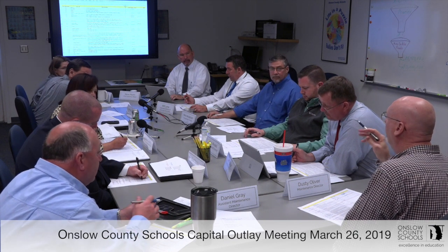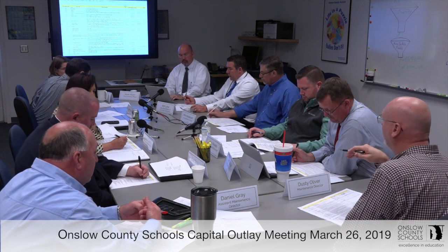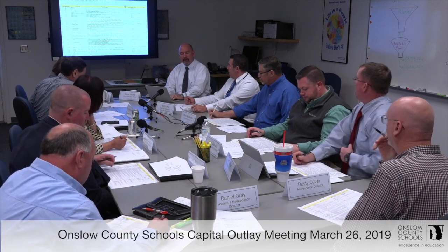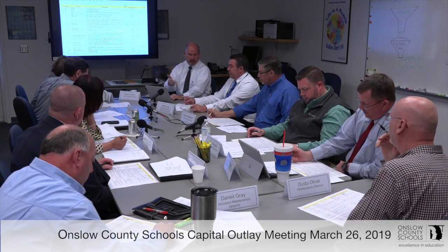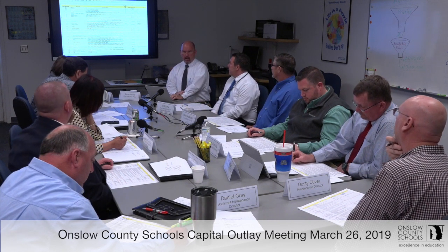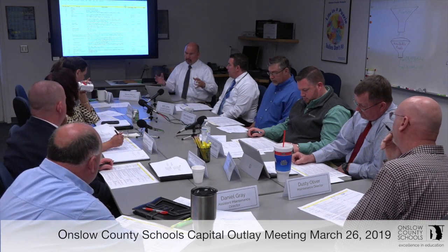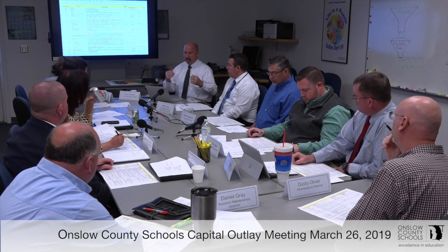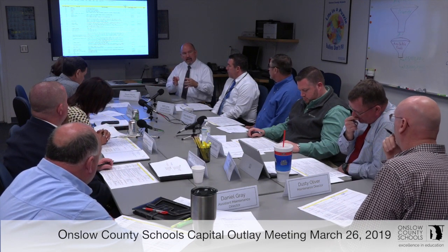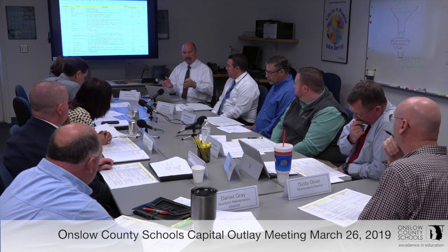Anything that doesn't go through this year that's been a request will continue into the process next year again, right? Right. One of the things we need to remember too, and I think it's been brought out to our board and the county commissioners, is that in our capital improvement plan, not the capital outlay, we identify the maintenance needs every year. The needs that aren't addressed that year roll over into deferred maintenance.